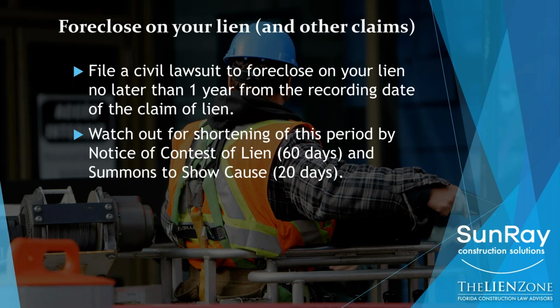This period of time can be shortened. You could receive in the mail, via certified mail, what's called a notice of contest of lien. From the date that document is dated, it'll have a clerk's stamp on it. From the date of that clerk's stamp, you have 60 calendar days to file your lawsuit to foreclose on your claim of lien. You no longer have a year. It's now been shortened to 60 days from that date. And again, you will receive a notice of contest of lien via certified mail.